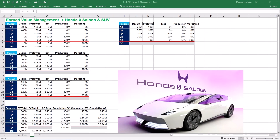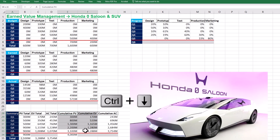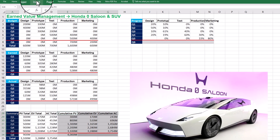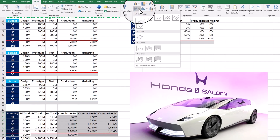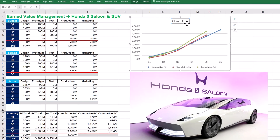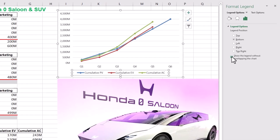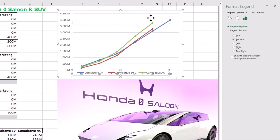Step 2 is visualizing earned value S-curves for project performance audit. With our values in hand, it's time to visualize them in a clear graphical format. First, select the project summary data in column A and include the column headings, then select cumulative PV, cumulative EV, and cumulative AC by holding the control key. Navigate to the insert menu and select the line chart with markers. Feel free to remove unwanted elements and customize the chart. Double-click on the legend to open the side dialog box and uncheck the box to show the legend without overlapping the chart.